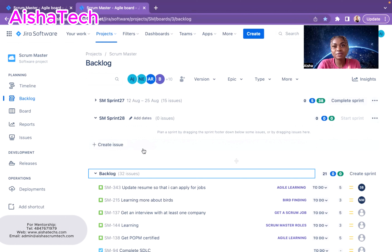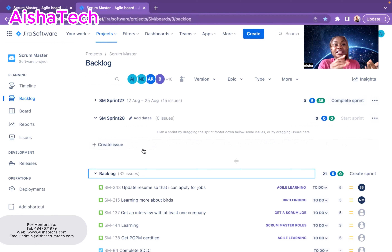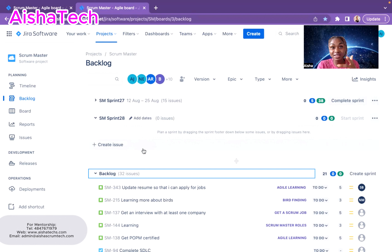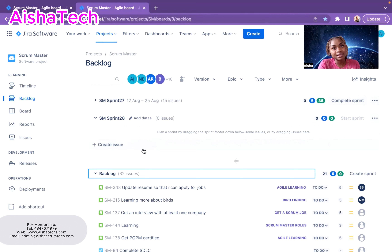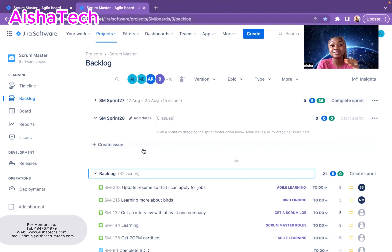Sometimes people ask what the Scrum Master's role is in backlog refinement. You may not always be the one driving it, but the questions you ask can help bring the team to reality and help the PO better prioritize. You can use the MoSCoW technique — Must Have, Should Have, Could Have, and Won't Have — and backlog refinement is the best time to use it. Get the PO to rank by priority so everyone knows what's most important.